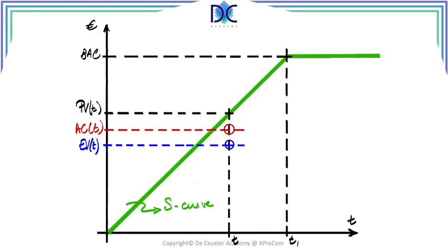At the moment T in time, the time that we measure, we find the PV at that time. That's the value of deliverables that I intend to create at that moment. I also have the earned value at that time. This is the value of the deliverables that we created at that time. And the third parameter, the actual cost in that period, is the actual amount that we paid to create those deliverables. So these are the basic parameters that we have, and we can already evaluate here.